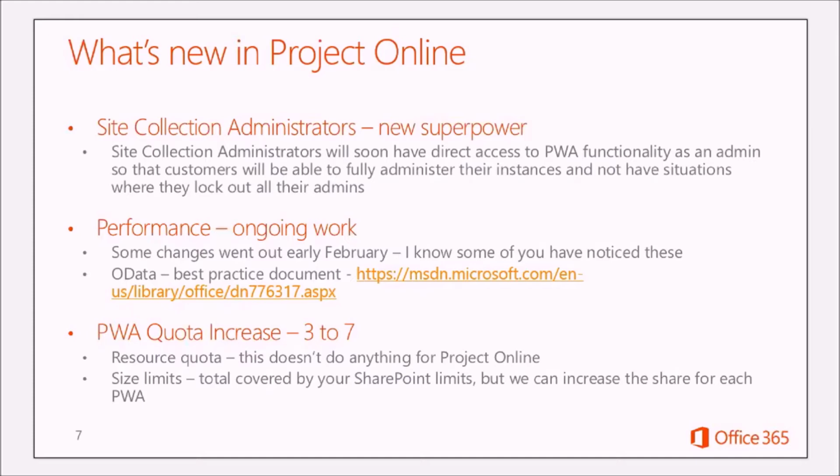Another piece of feedback we've had on the support side is the performance of OData. And there is a best practices document, and I put the link into the presentation there, which gives some guidance for how you can get the best out of OData. And some of that is using SQL Server Integration Services so that you can pull data to either a local or a cloud-based SQL Server for ongoing reporting.